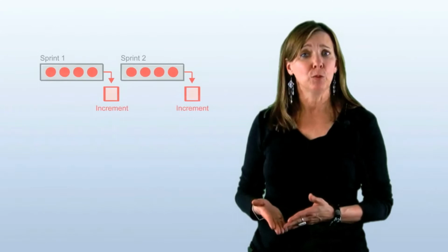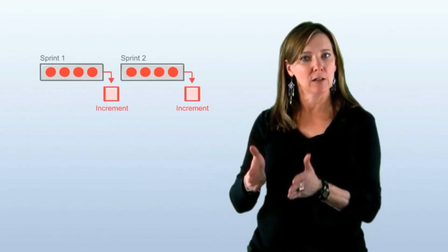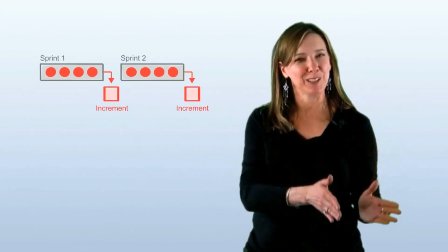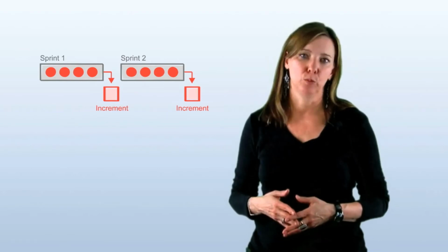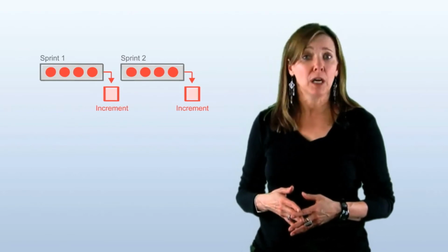Finally, the truth is in both of them there's a sense of cadence. In Scrum, we're looking for a cadence of increments. How can we regularly deliver increments of working software? In Kanban, there's a sense of flow. So the cadence turns into a flow of how can we create a flow of delivering what are called minimal marketable features. So that's just a short overview of how you might compare and contrast both Kanban and Scrum.